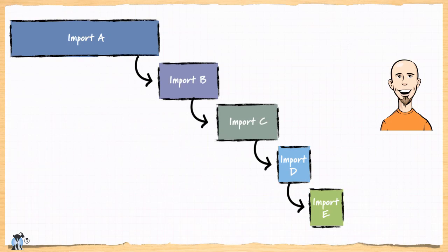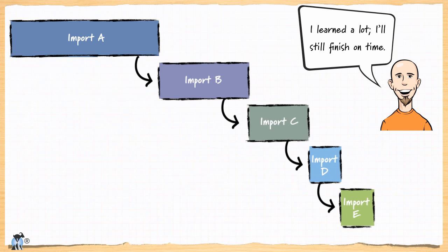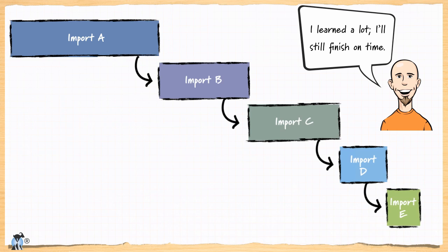I asked him what impact he thought this would have on the rest of the schedule. He said, oh, no impact at all — I learned a lot doing format A, so the rest will go faster than planned. I'll still finish in nine days total. Well, you can guess that this isn't what happened. The problem here was that the nature of the work was highly correlated. If importing from format A took 50% longer than expected, our best guess for the other formats is that each of those will also take 50% longer than initially expected.